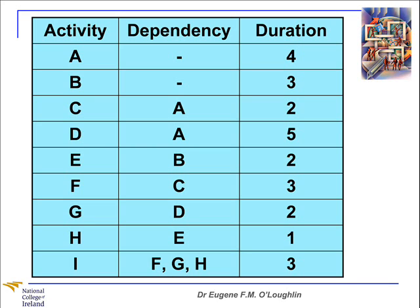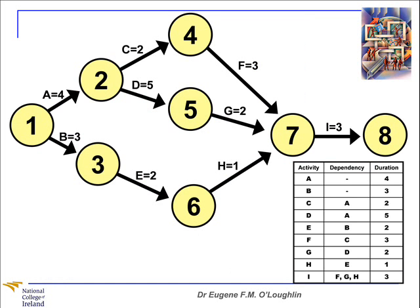So straight away, I can see that my diagram is going to have some bursts and merges on it. The clue to this is that in the dependency column, you can see activity A listed twice, and down at the bottom, activities F, G, and H all lead into activity I. So I know before I draw my diagram that I'm going to require bursts and merges. On this picture here, in the bottom right-hand corner, I have a small version of the table with the activities, dependencies, and durations listed. So hopefully you can see those in the table.